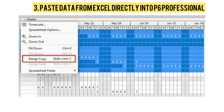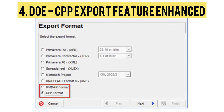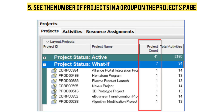The fourth and most important feature is the XER/CPP export feature enhancement. When exporting Primavera P6 data, version 23.12 adds a CPP format option. You can export projects and baselines to CPP format when P6 Professional is connected to a SQLite or PPM database, and even when P6 Professional is connected to an EPPM database but is in offline mode. You can also create export templates for exporting project data to CPP format. CPP fields must be mapped manually when creating CPP templates in P6 Professional.